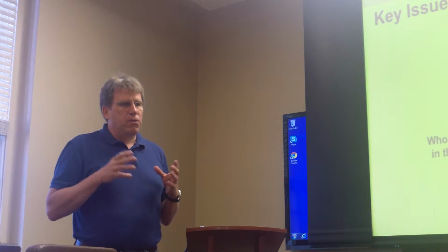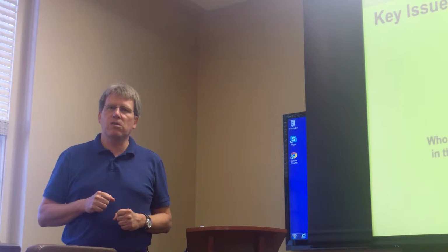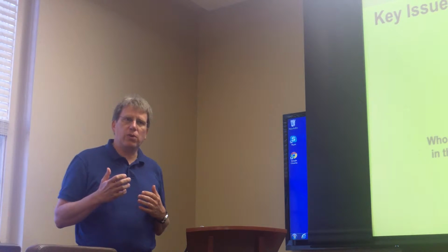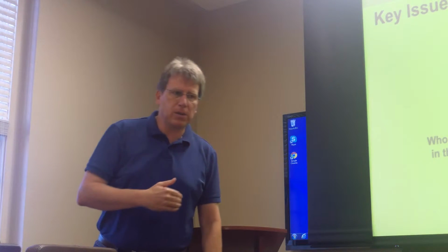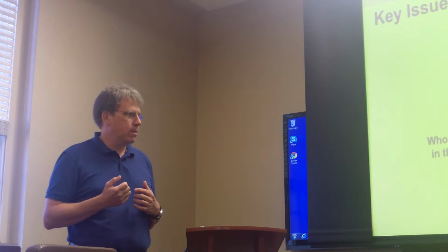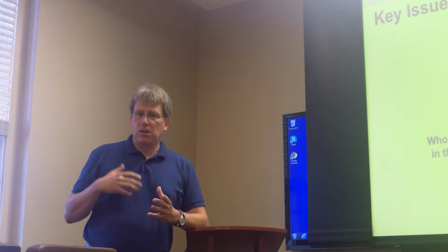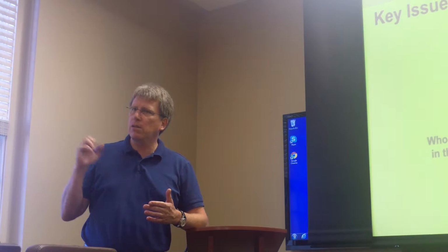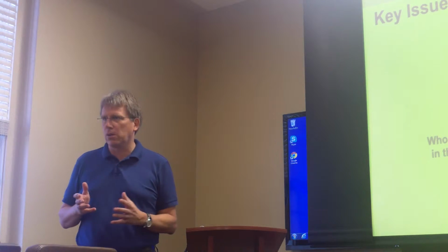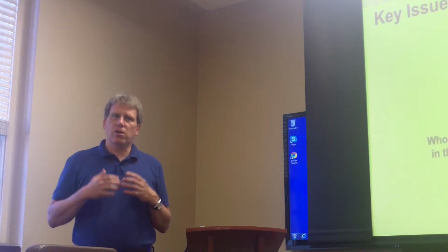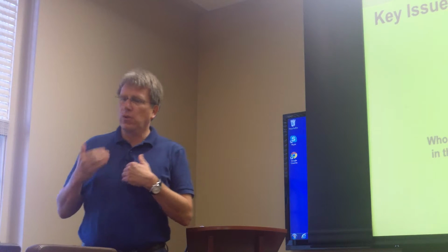Looking at this question, it might be a little bit funny that identifying all stakeholders in a project is not very easy. Think about a situation where you are in a consulting company, coming to a different company, helping them to deal with a problem there. They want to start a project and very often you won't be introduced to each stakeholder. There are some hidden stakeholders, and they have to be identified to have a successful project. Because a hidden stakeholder you could not address, and a stakeholder that is not addressed can be a real opponent of the project. So you have to address all stakeholders.